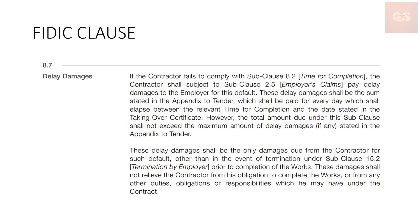Normally the limit will be around 10% of the contract amount. When you fill in the tender documents and the appendix to tender, you can accept the delay damages being put forth by the client. You may also reject it and put forward your own amounts that you think are fair. For example, if the client proposes 0.01% per day and you think that's not fair, you can propose something lesser like 0.005% of the contract amount per day, and mention that in the appendix to tender.